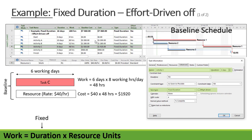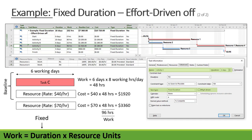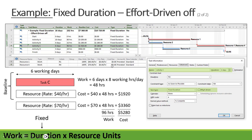If effort-driven is off with fixed duration, only the duration is fixed — work and resource units can change. Adding an additional resource means both resource one and resource two each work 48 hours, so work increases to 96 hours and duration remains 6 days. The total cost increases to $5,280: resource one is 40 × 48 = $1,920, and resource two is 70 × 48 = $3,360.